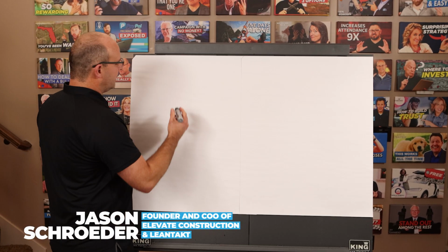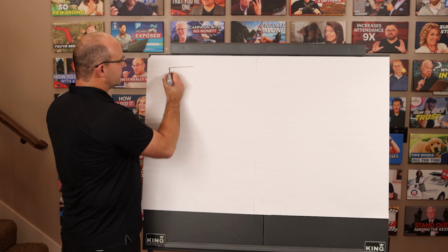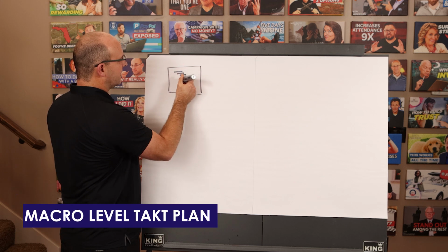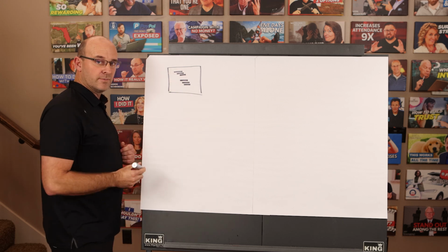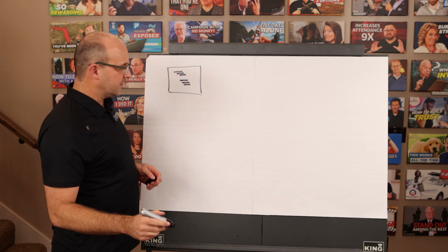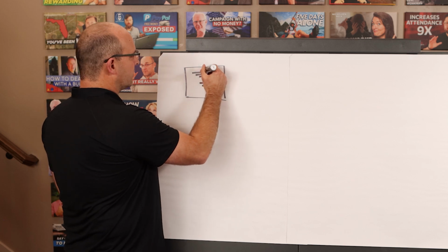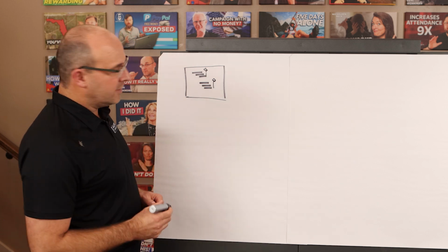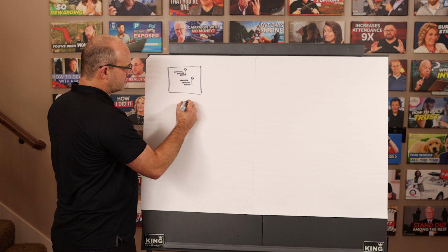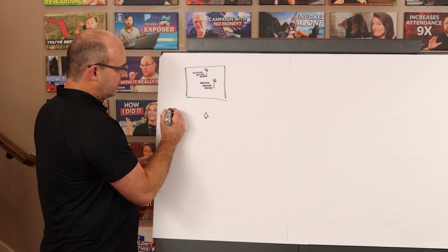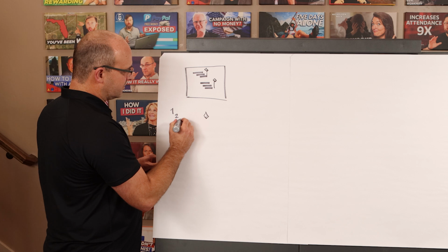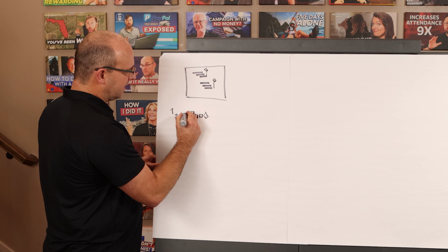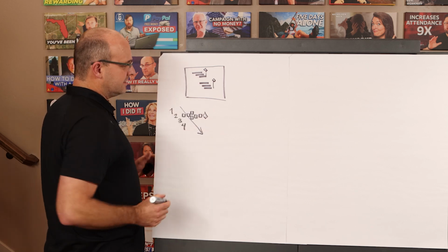So we already know that on your project, if you're doing your planning right, you will have what's called a macro level Takt plan on a 5-day Takt time, and it will be the basis of your overall production plan and the contractual promise. Once we take those milestones, which are conservative, include the reference class information, and have been reviewed with fresh eyes, you can pull this milestone down and we do a pull plan to it. But we do a pull plan to the right number of zones. So we actually do our pull plan for one zone and then we cascade that throughout the multiple zones and see if we have diagonal trade flow.